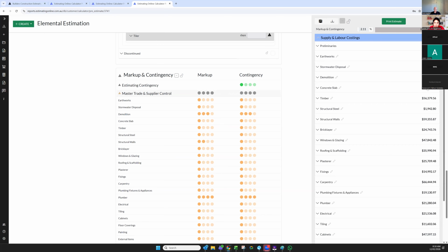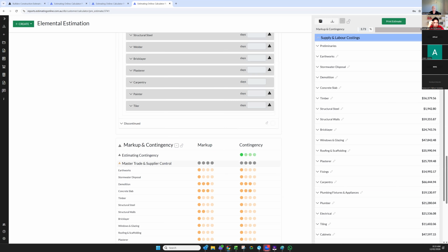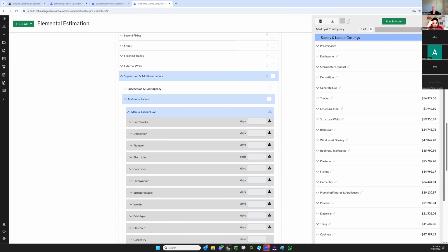So my budget is set at $33,000 right now. What we're required to do is change our settings. Now, what I think builders should be doing, they should be running multiple estimates as a test phase. During that test phase, we're going to change our settings until we get to the quotation price or the final invoice price. Once you do that, builders and estimators are going to know what the estimating online settings are. I can dive more into that at a later stage, take it a little bit slower, but that's in the coming weeks.